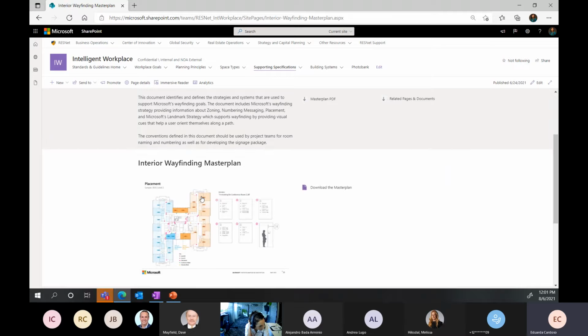So I would say, we do want to do PDR for room numbering and signage, but we can do it ahead of time. Once you guys number your plans per this new standard, we should send that in for PDR. They can do a review, make sure the sequencing and the journey through the space works as intended, versus waiting for a formal signage package to review all that. So I like to do the room numbering review ahead of time.